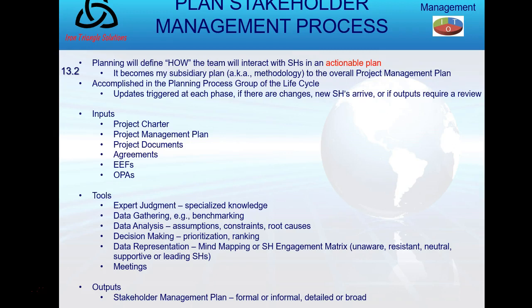Okay? And there are typical trigger situations requiring updates of these stakeholder lists. When I start a new phase, I'm looking for new stakeholders. When there are changes in the organization, that's going to trigger looking for new stakeholders. When new stakeholders arrive: in the military, we have people move in and out of bases on average, especially at the officer level, but senior enlisted and many other people.